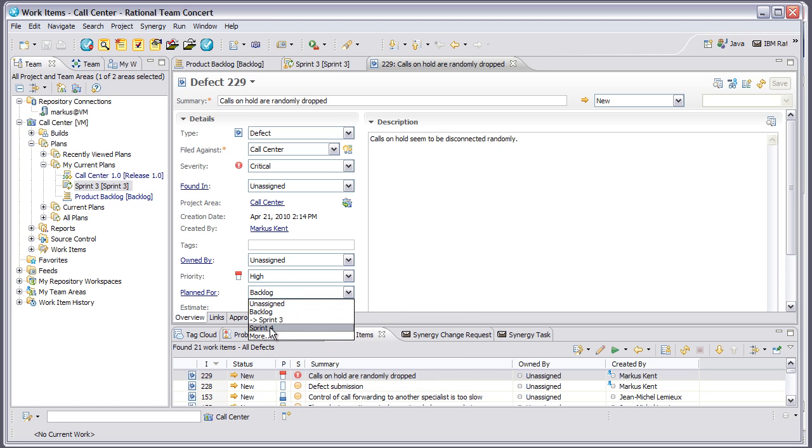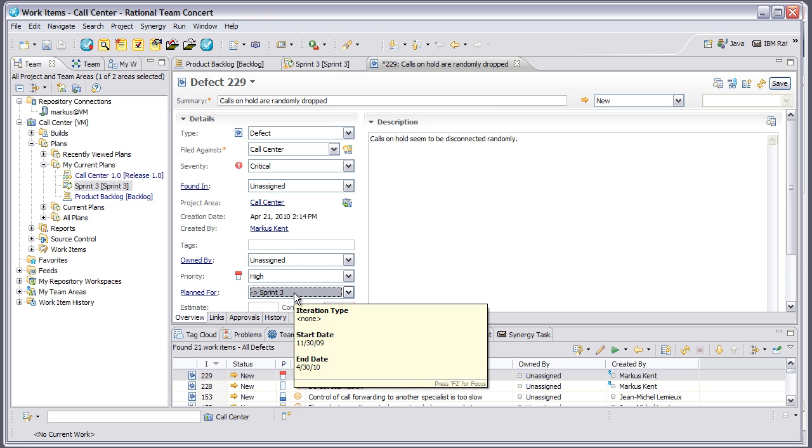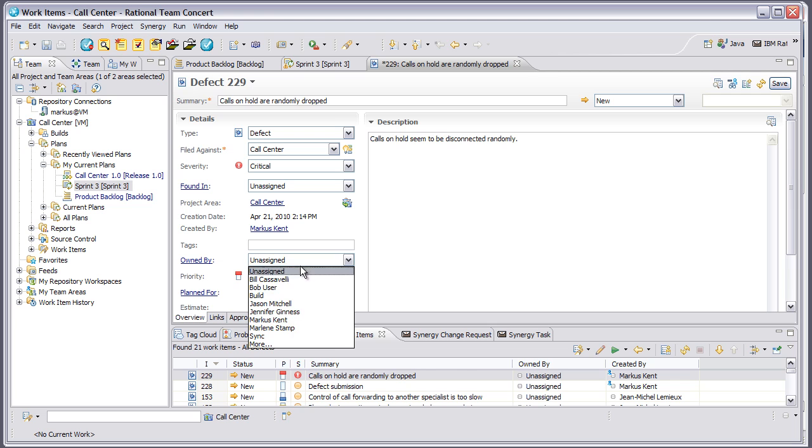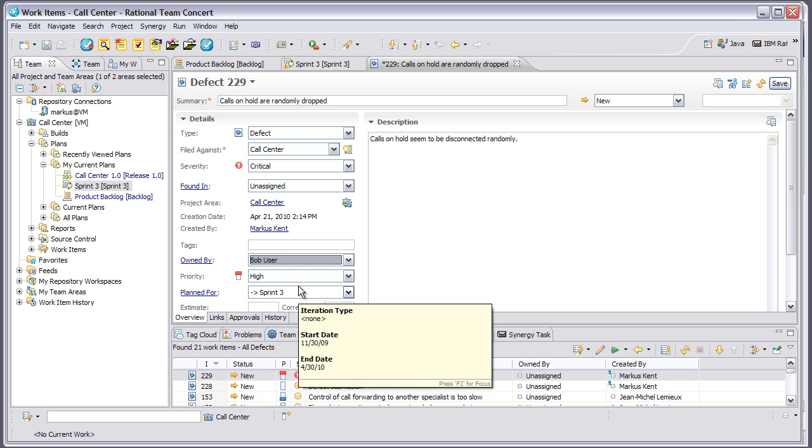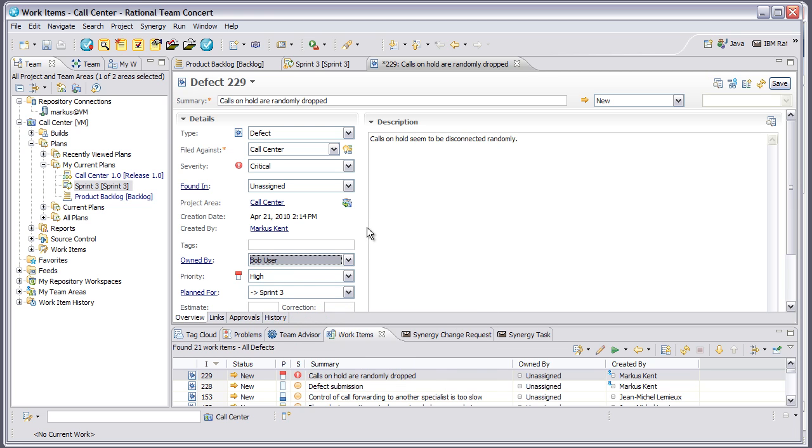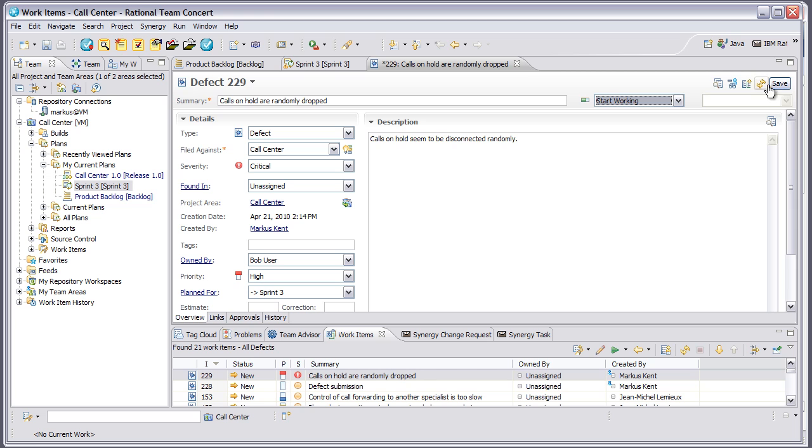So I'm going to plan this for Sprint 3, which is my next iteration. I'll assign this to Bob user to work on and set this to have Bob start working on it. When I save this,